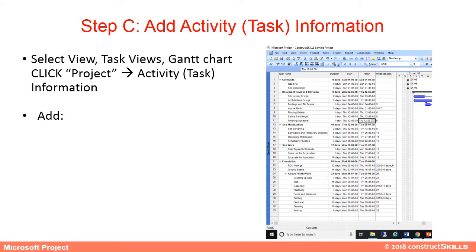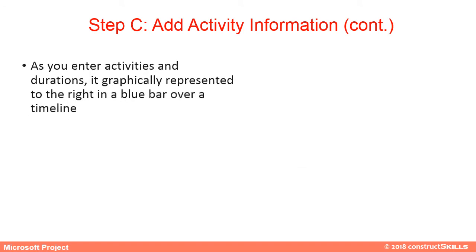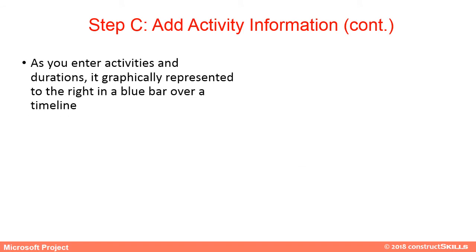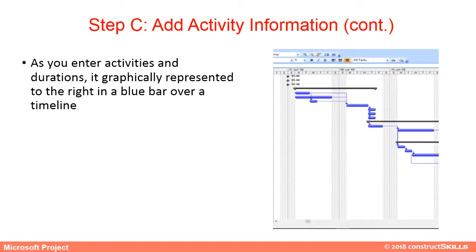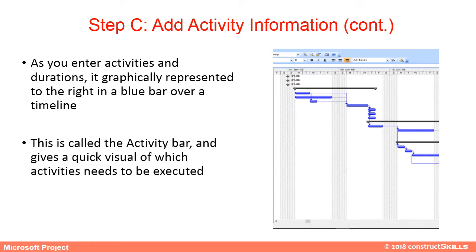Type a task name in the first empty task name field, then enter the duration required to complete it and the relations between tasks. Activities are called tasks in MS Project. As you enter activities and their durations, they will be graphically represented to the right as a blue bar over a timeline — this is called the activity bar, giving a quick visual of which activities need to be executed.